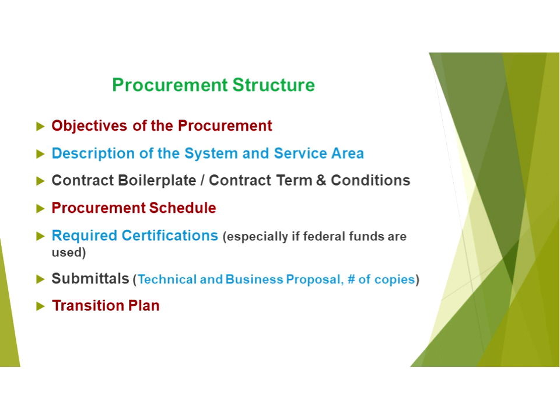If your procurement includes a call center, then your price sheet should have a fixed line item to cover rent, supplies, and overhead, as well as a variable line item to cover labor. I just like separating fixed costs from variable. Each broad functionality should have a line item to cover license fees, as well as the provision of hardware, software, and communications. And again, the call center, ride booking, and scheduling technology should be separate from the dispatch and customer service technology. By separating these line items, spotting a lowball proposal becomes so much easier.